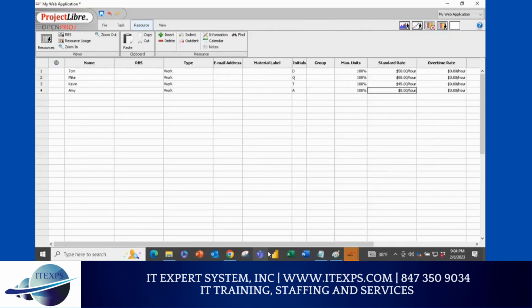And Amy, she works a little bit higher, her rate is $100. Now this is the standard rate for an 8 hour work schedule. But let's say if someone works overtime, then we multiply by 1.5. So let's say we give $75 to this person, and if we work here, let's say we give $100 to this person, and we give $60 for this person, and this person 125, 150. So that's the overtime.